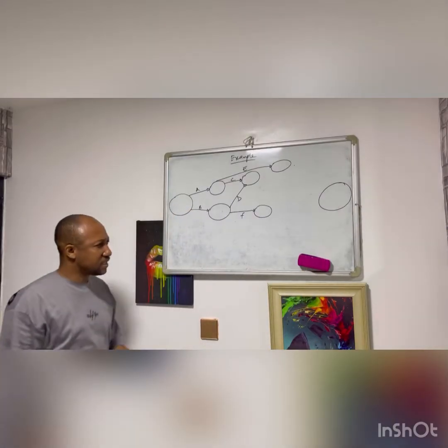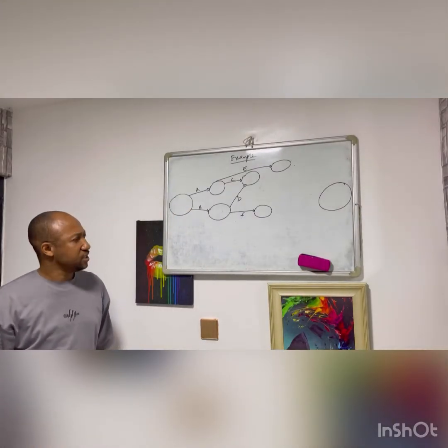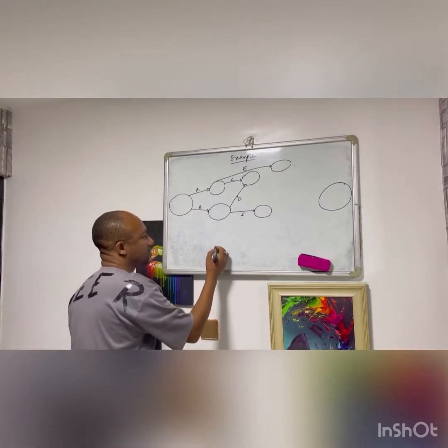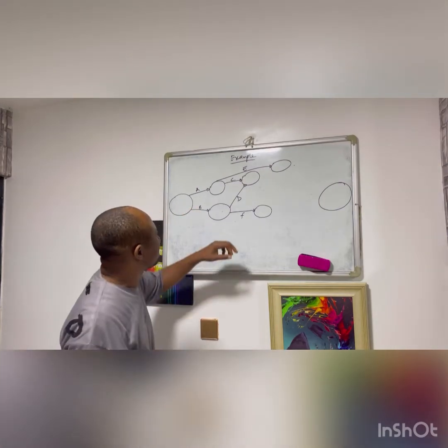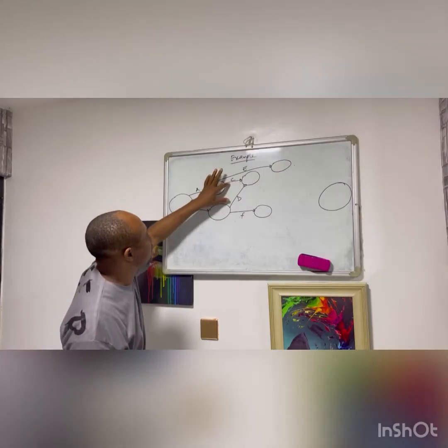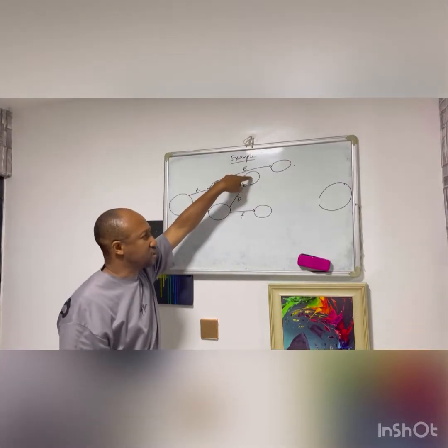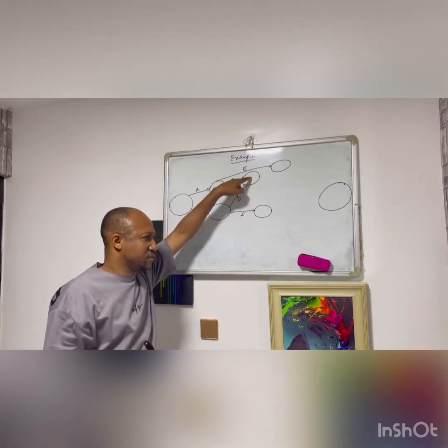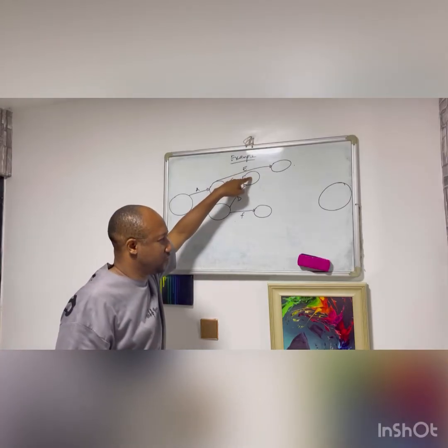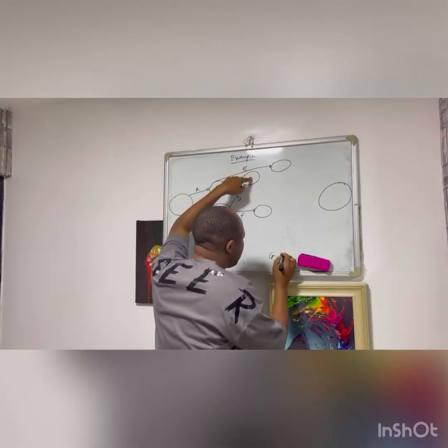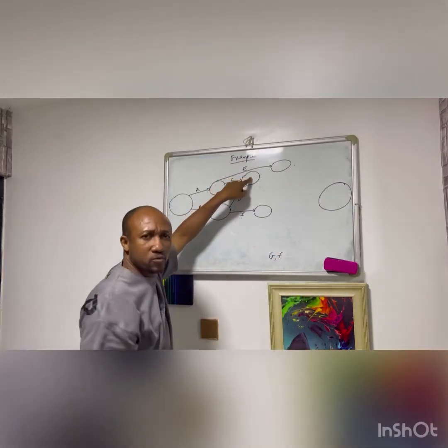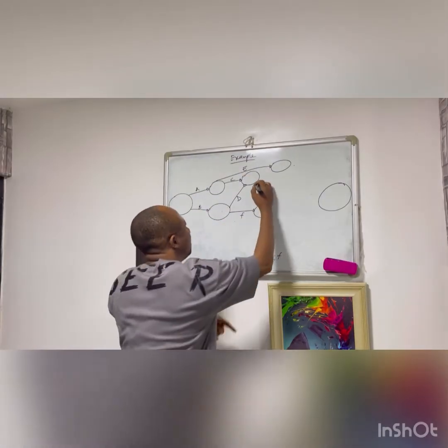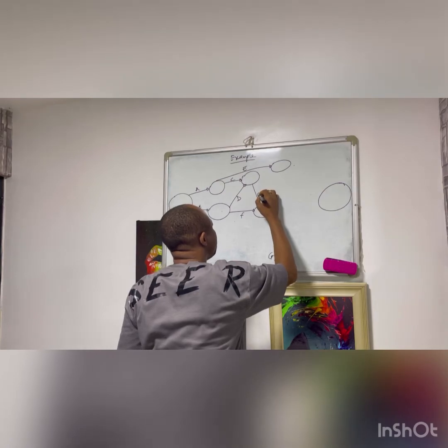Having drawn activity F, the next activity for me to draw is activity G. Then what is the preceding activity of activity G? The preceding activity of activity G is activity C and D, meaning that activity G will commence from this circle where C and D end, because C and D is the preceding activity for activity G. But now that I've known the origin of activity G, then where is the conclusion of activity G? Activity G will conclude where F is, because G and F are supposed to conclude together. So activity G will originate from here and conclude here where F is.